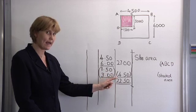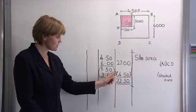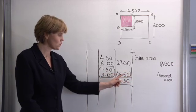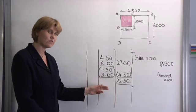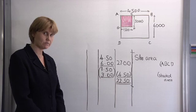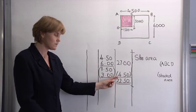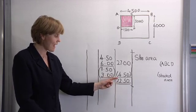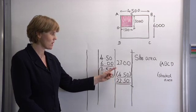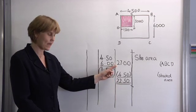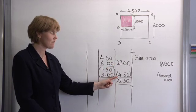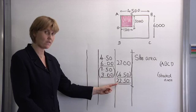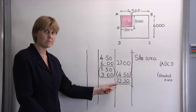Note that when we square the squared total also has brackets. Now let's work out our total site area. So as before we add up everything above the line. So we have 27 metres squared less 4.5 metres giving us a site area of 22.5 metres squared.